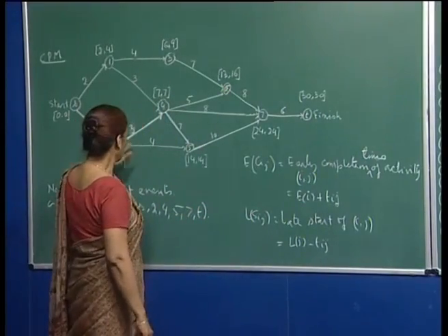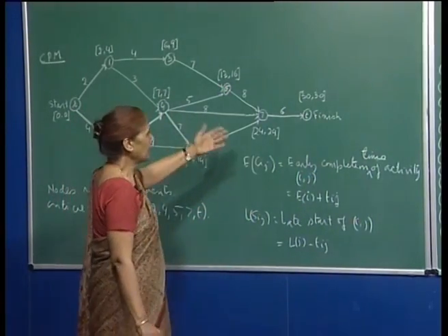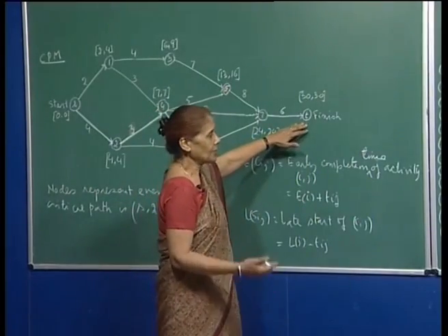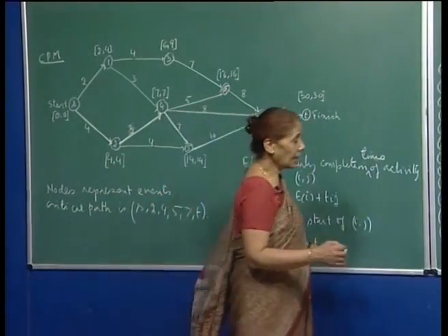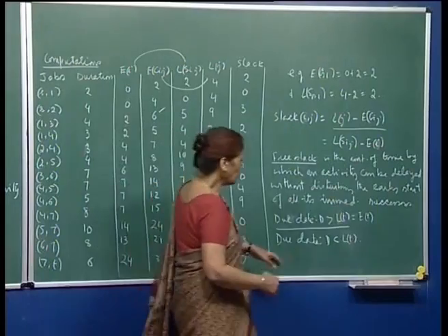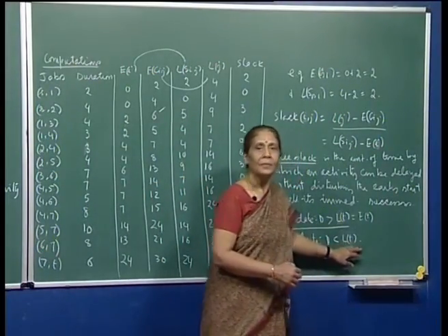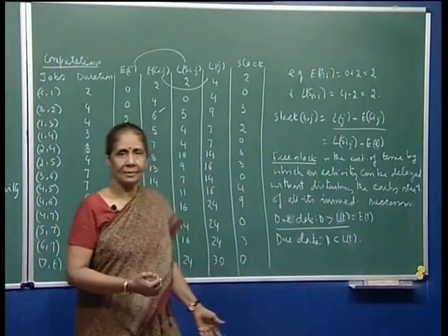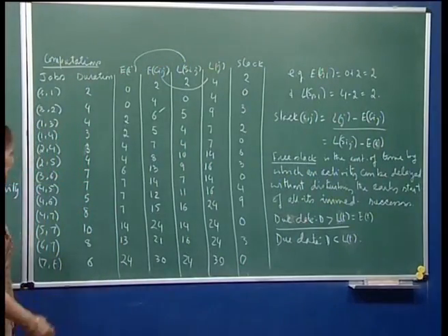So, that is a happy situation, because the manager then has even slack time for critical activities also. But in case the due date is less than your project finish time, then there will be negative slack, and then there is more cause for tension and so on.